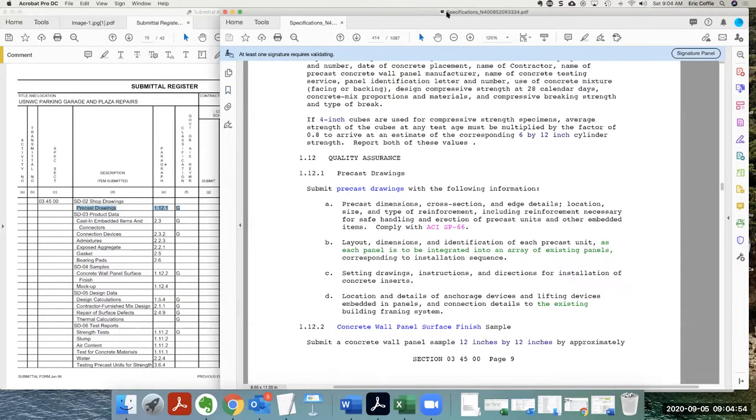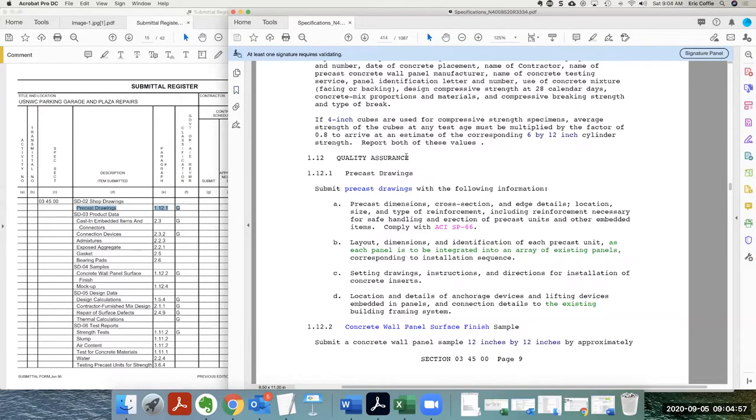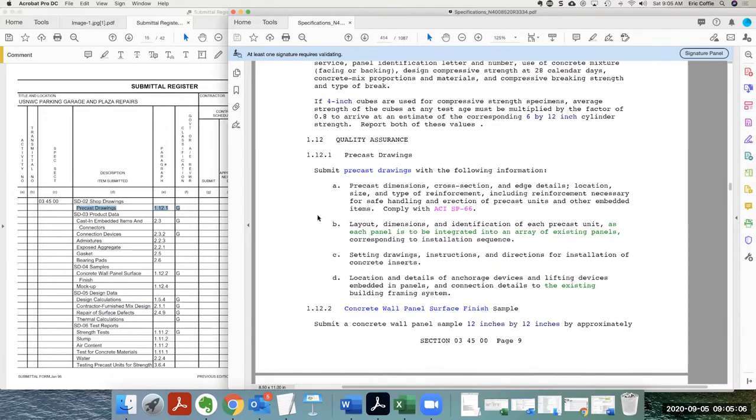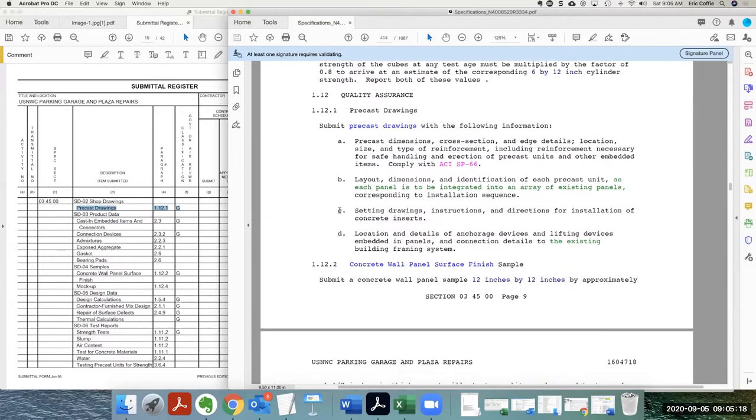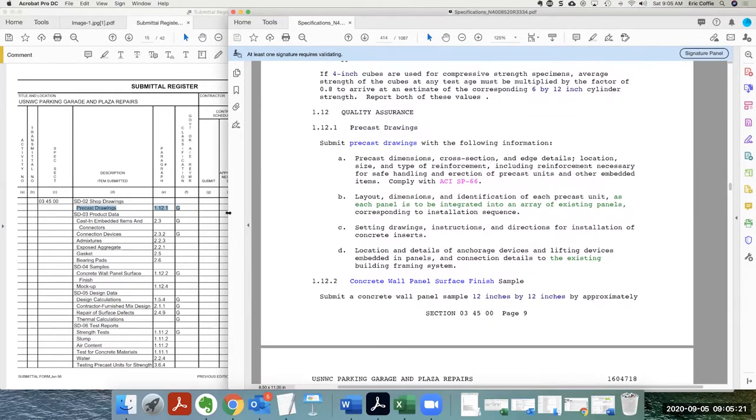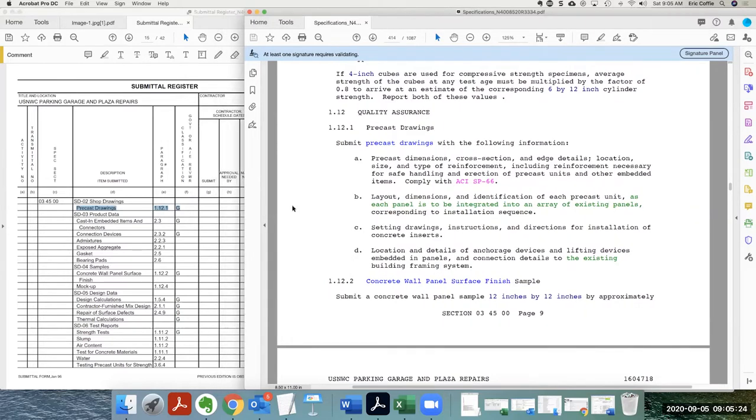Have you ever run into a contractor that was unable to do his paperwork? Yeah, all of them. Okay, so what do you do in that instance? We help them. Yeah, okay. But also, with the big companies, they start fining you for not doing paperwork. Oh, you get fined for that? Oh, wow. Yeah, because you're delaying the project now. It definitely makes sense. You can't start until all this is submitted and approved. Yeah, they need that back ASAP.